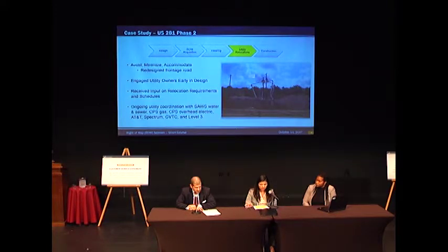And on this project and on others, we're having one-on-one meetings. We started off the project with the general utility coordination kickoff meeting, and then we started going to one-on-ones with all the utility partners that you see on the screen. Those one-on-ones are a lot more efficient. You get into the details of the conflicts and not bore everybody else who's in the room that doesn't really care about everybody else's conflicts.